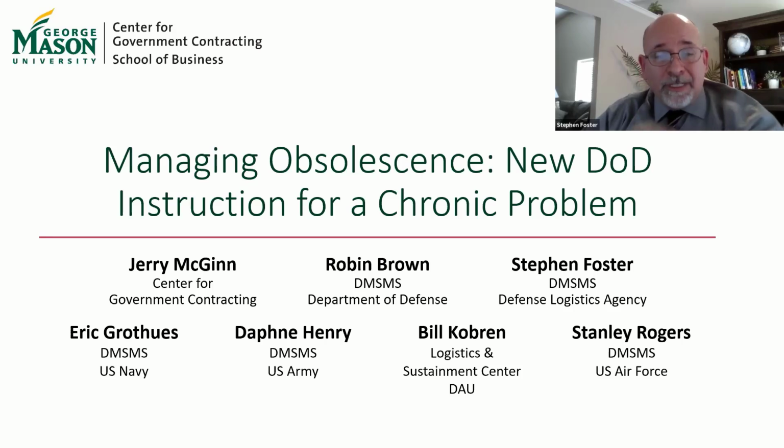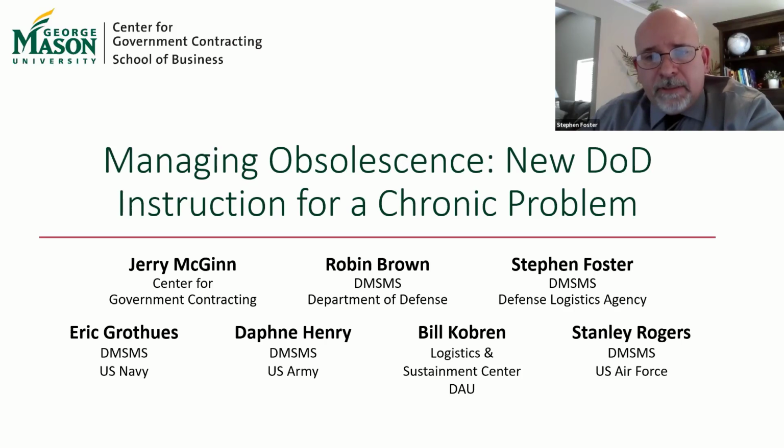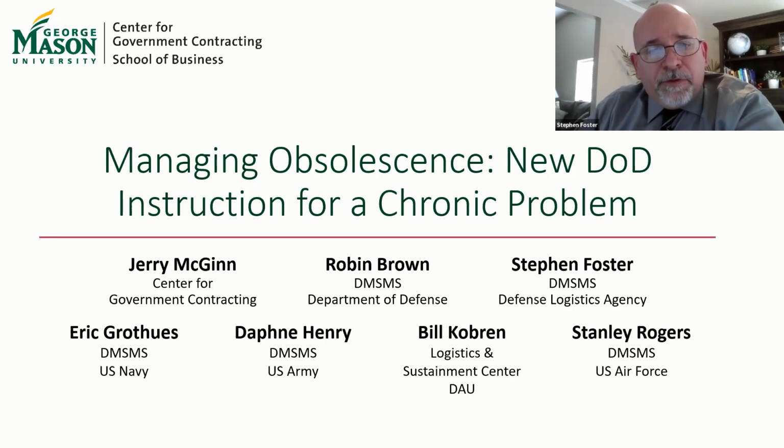I think primarily there are a few different points in it that will help. First, I think it's going to guide and help standardize the needs for the different system managers when they come to us with DMS issues. Because when we get a DMS issue, we research, try to find parts, alternatives, and make recommendations to satisfy that need. If we can't, of course we let them know. If there are parts available, then we try to do an end of life or life of type buy